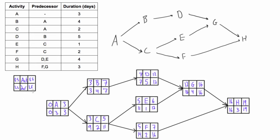To identify the critical path, we figure out which activities have their early finish and late finish being the same. Activity A: early finish and late finish are both three. Activity B: both seven. D: both twelve. G: both sixteen. H: both nineteen. So A, B, D, G, H form the critical path. If we delayed any one of these activities by even one day, the entire project duration would increase by a day.